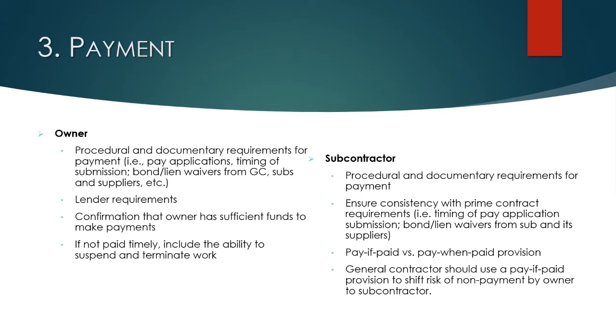Similarly with the subcontract provisions, there needs to be some procedural and documentary requirements for them to get paid. It should be consistent with what the prime contract requires of you vis-a-vis the owner-general contractor relationship. The other thing that is important to include in your subcontract, to the extent you can, is a pay if paid provision. There's a difference between a pay if paid and a pay when paid provision, and I won't go into the details of that right now, but you need to have something in your contract with your subcontractor